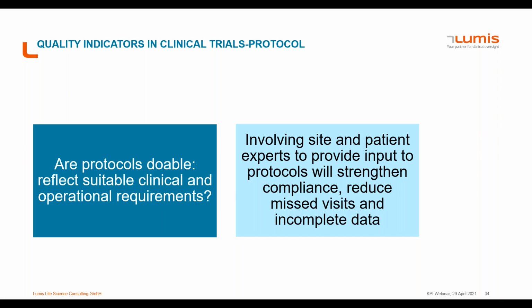Involving site staff and patient experts in the creation of protocols, reviewing operational and logistical requirements very early on will support the overall quality of the clinical trial protocol and will reduce protocol non-compliance and also encourage patient retention in the clinical trial. So doability is very, very important to the overall quality of the clinical trial. Next, please.